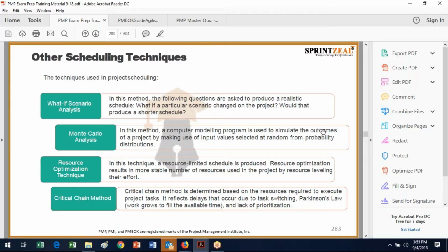But basically, you don't want to necessarily increase staffing and then decrease staffing and then increase staffing and then decrease staffing. It would be better to have a flat level of staff so that you don't have people coming and going and being brought onto the project and having going away parties. They keep it consistent. Then you don't bring in people who don't know anything, and you don't let go of people who maybe are the only ones who know some key fact.